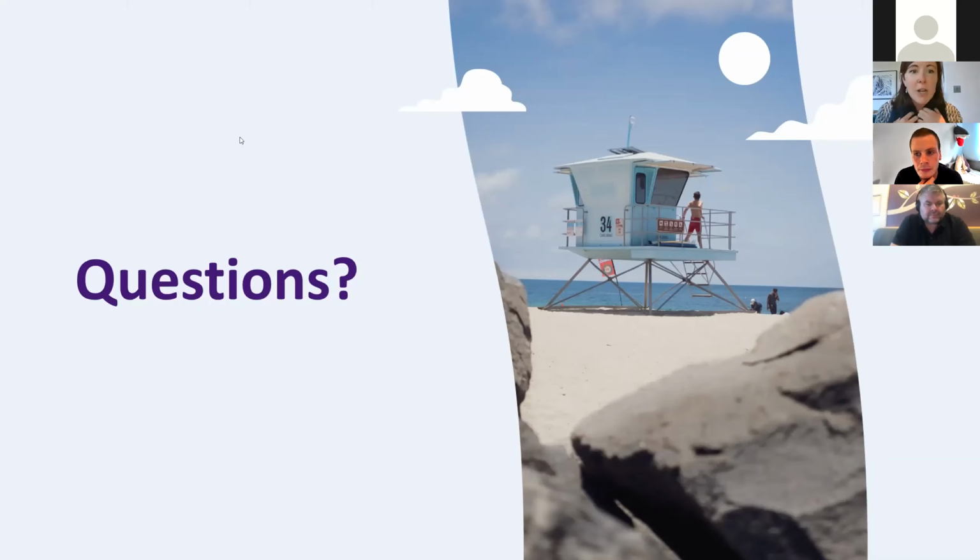So I, as the person running it, would probably go down that today line on my own first. So I would say, well, I need to find out about the slippage. I need to ask whether there's any wiggle room in that knock-on activity. I need to ask what the impact of that further down the line outcome is. So I would send out those questions to my workstream leads as prep beforehand, and I would expect them to have thought about answers, not bullshitty answers, but actual, okay, no, I haven't thought about that, but this is the person I'm going to speak to in order to work out whether or not we do have any contingency there, that kind of thing. So I would send those out beforehand, and I would expect each of my leads to do that preparation beforehand.